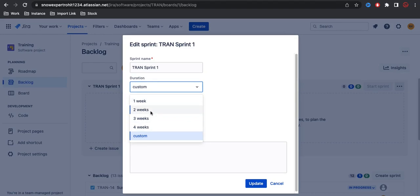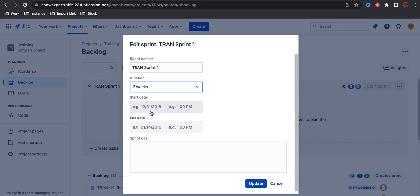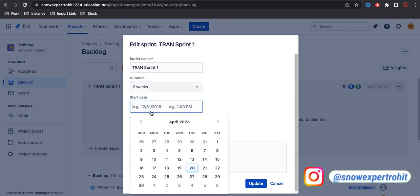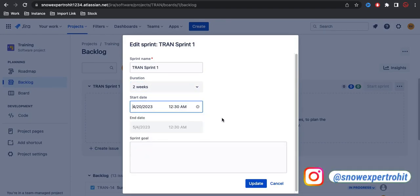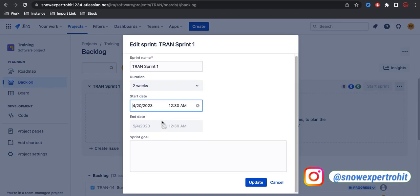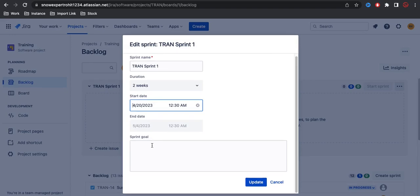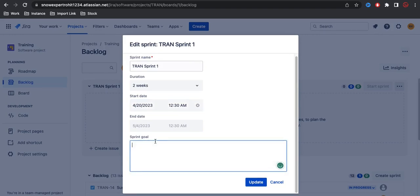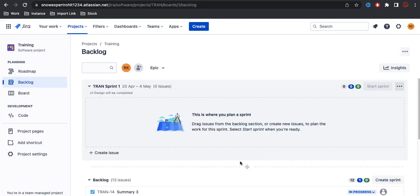You can select the duration - one week, two week, three week, or four week. Normally sprints have a two-week time period, but depending on your use case you can decide. Let's say I'm selecting two weeks and today's date as the start date. Once I select today's date it automatically calculates and populates the end date. You can also define a sprint goal - for example, within this sprint we are trying to achieve the UI design. Once we click update, the sprint is updated.